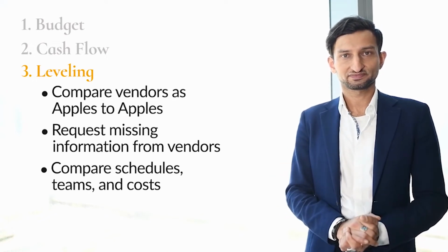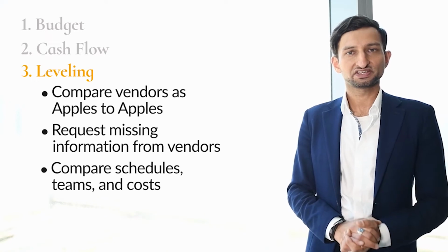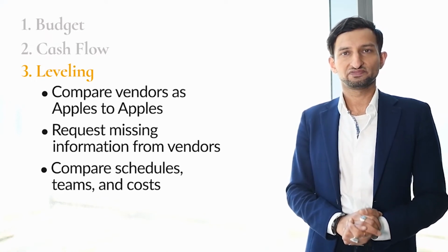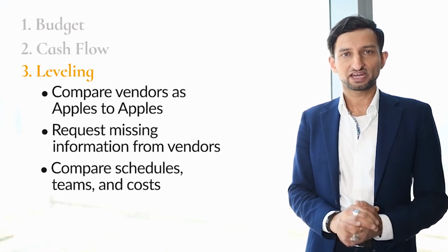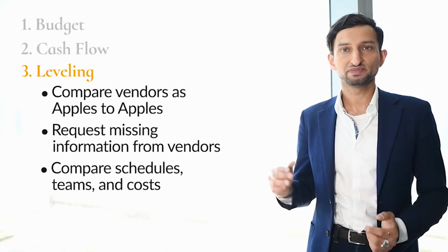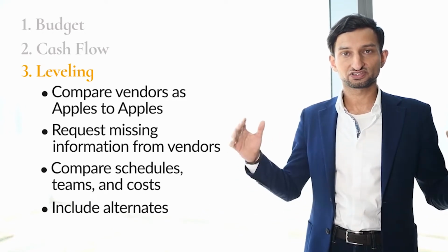Compare the schedules offered by each vendor, and also, where it applies, be sure to evaluate procurement, delivery, and installation fees. For some scopes, such as IT and security, there are multiple configurations achieving the same result. And for such situations, be sure to also evaluate quality and good compatibility with your native systems on your project, as well as long-term maintenance costs. Be sure your final cost includes all chosen options.